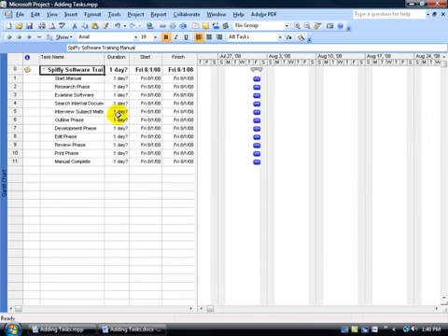Now it's not looking at it collectively, counting up 1, 2, 3, 4, all these days here. It just says, look, the first task starts on August the 1st, and also the next task, all the tasks start on August the 1st, and all of them end on the same day. So it takes the earliest task, the start date, which is August the 1st, and then over here in the finish field, it'll take the task, the longest task, and say that that's the project summary finish date. And you'll see more of this in the next training video on setting up our durations, because not all of them are going to be 1 day.